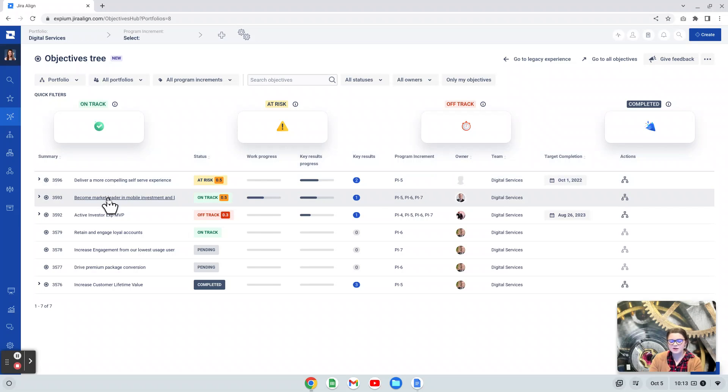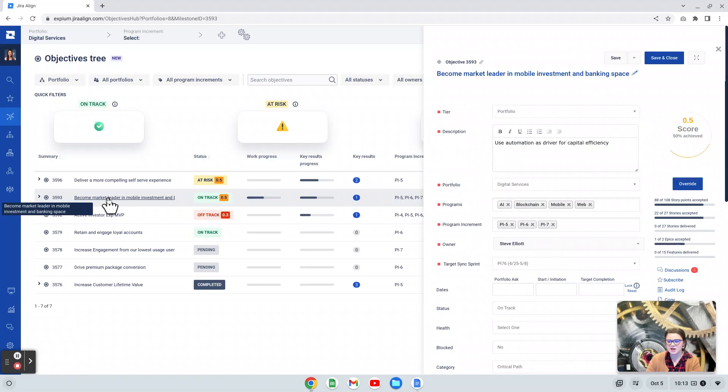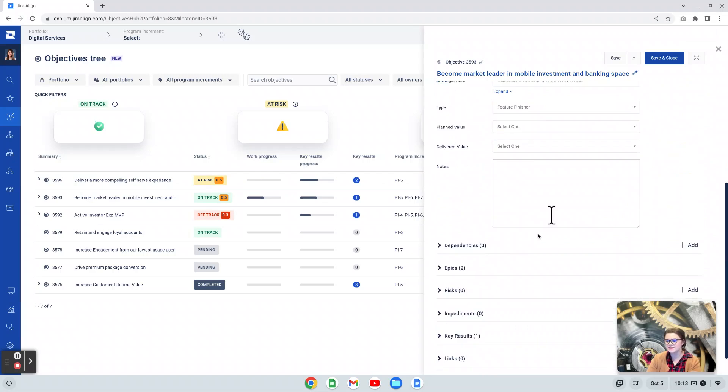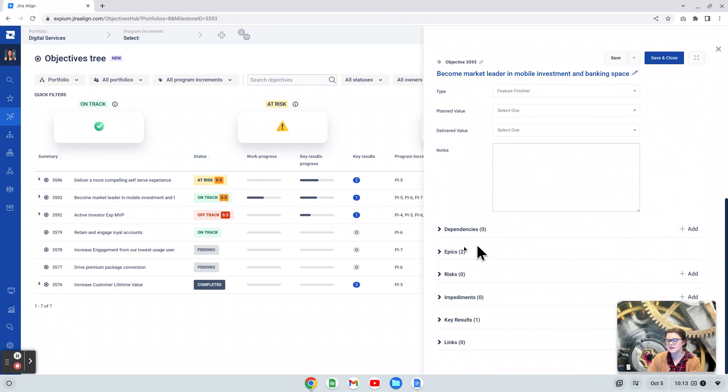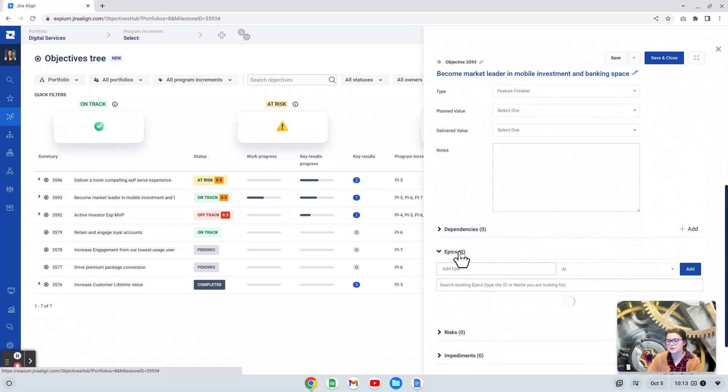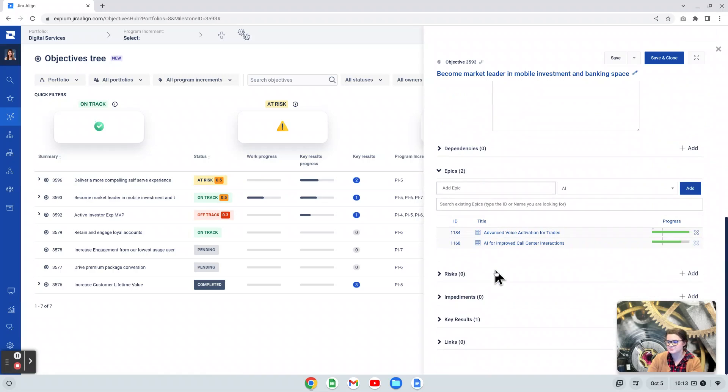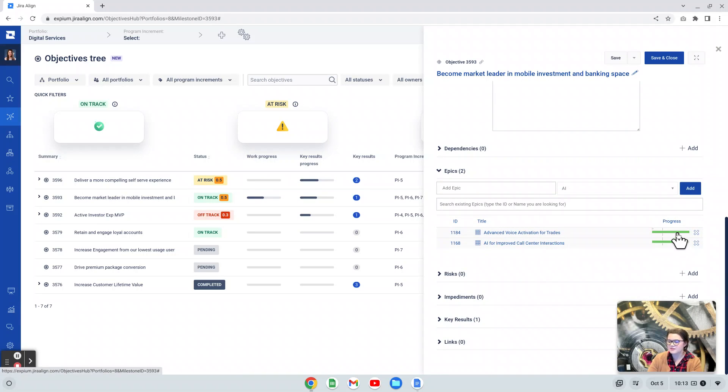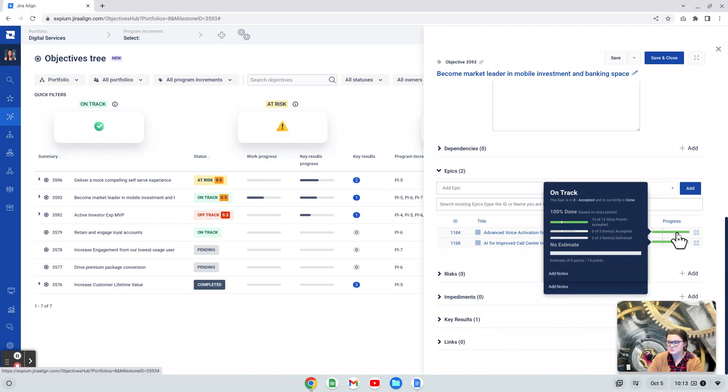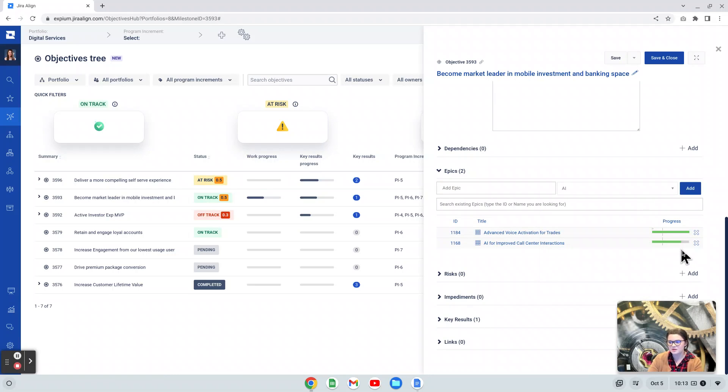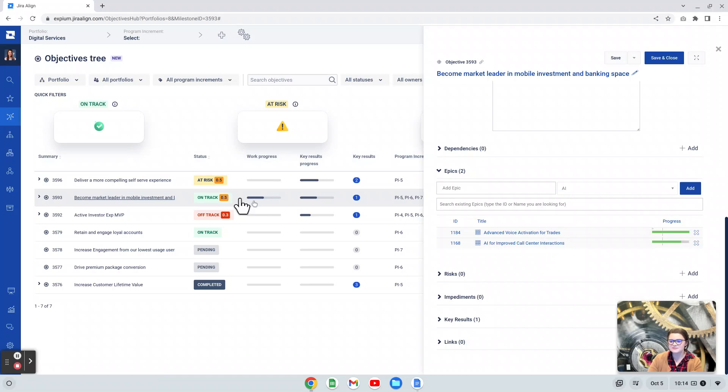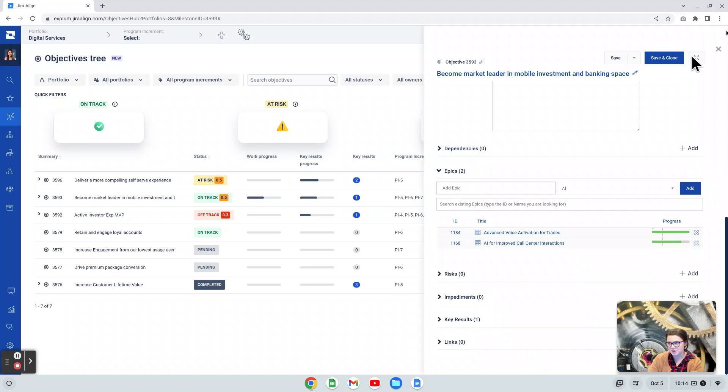I'm going to go ahead and open this objective up just to show you that at the bottom, again, in that link section here, I can see that I have two epics linked to this portfolio objective. Here, when I expand that, I can see I have completed one of the epics, it is in the accepted state, and I have not completed the other, and that is where this 50% complete comes in this bar.